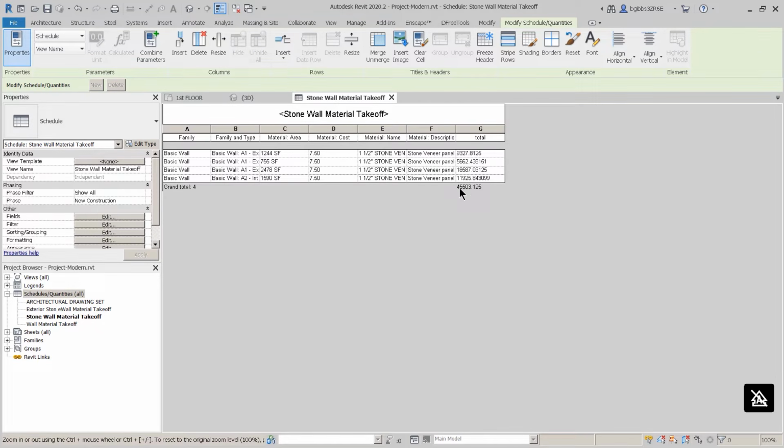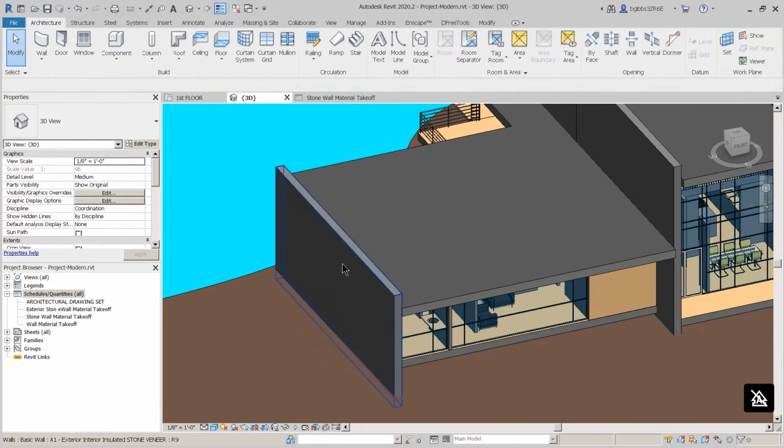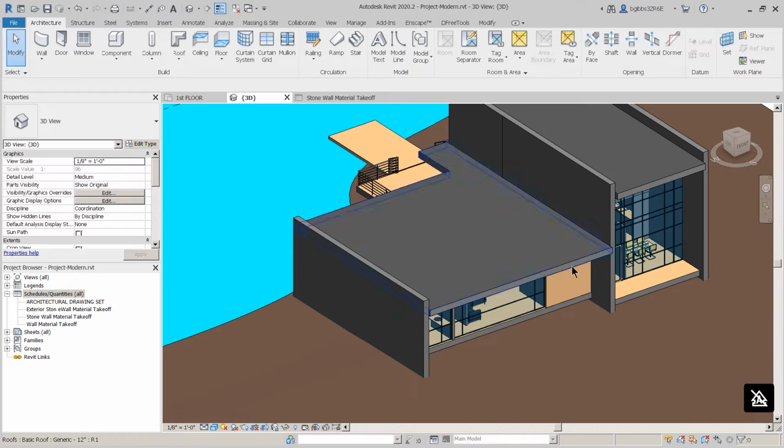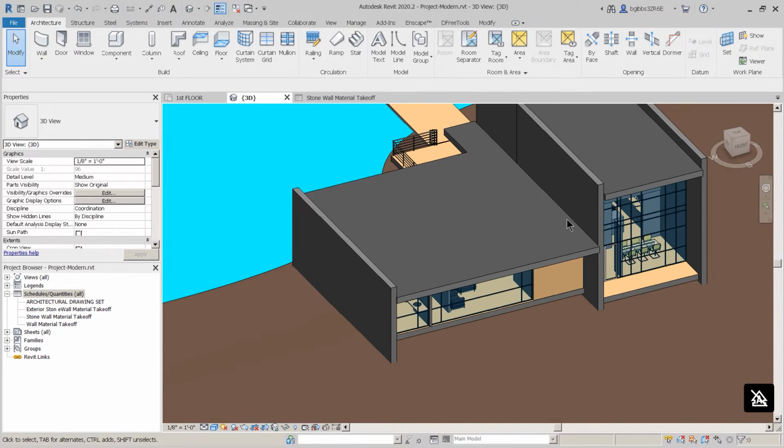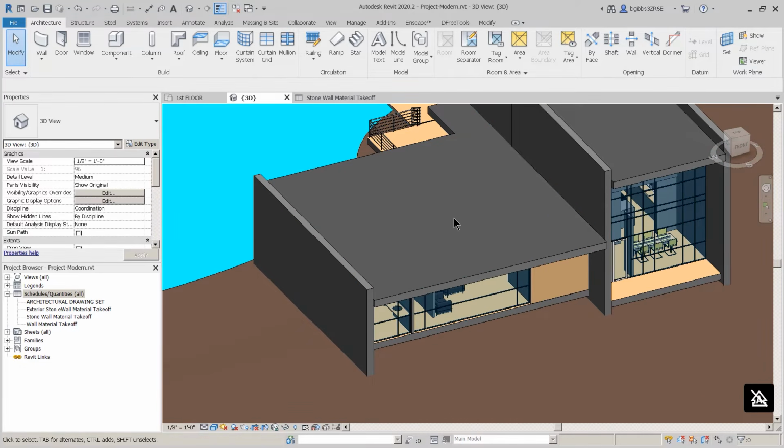already have an estimate that it's going to be $45,000 for our stone. That's a lot of money. So being able to estimate quickly and seeing, hey, maybe this is too much for my project. Maybe we want to come back and shorten the wall. Or maybe we want the interior materials to be a little bit different. Some sort of way to balance the project. And maybe if this costs a certain amount, maybe we will save on finishes or assist them in another part of the project.